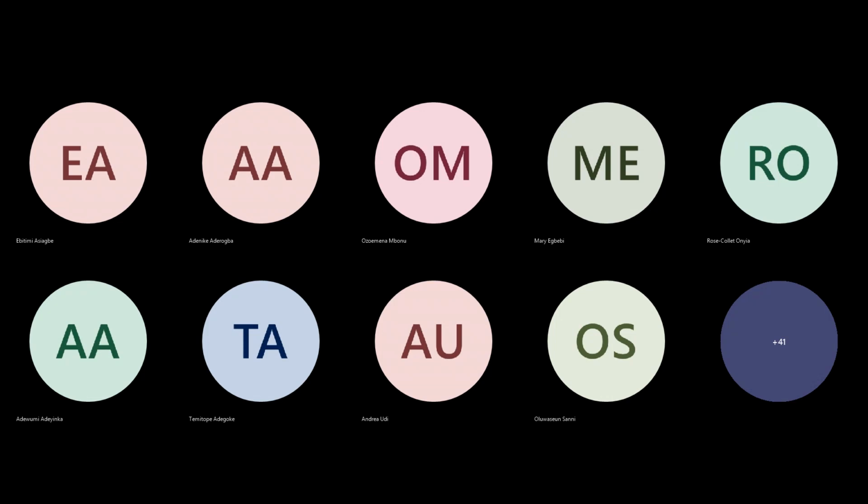You are going into the second week of your sprint zero. By the second week you should have all your requirements and you should have populated your backlog, because the following Monday will be your sprint one, and everybody will be looking to you asking where the requirements are. There's so much resting upon your shoulder that sometimes you don't have a choice than to message stakeholders over and over again, if that makes sense.